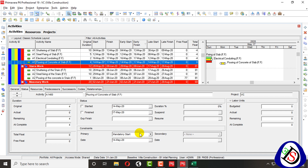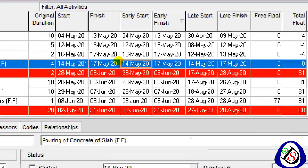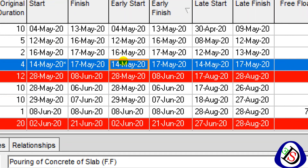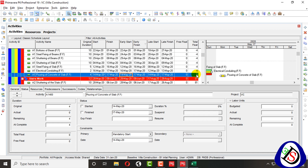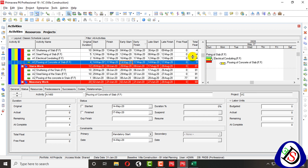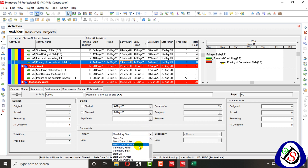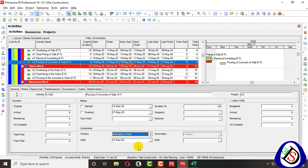You can see from here: Early Start date, Late Start date, and original Start date — all dates are fixed at 14 May. This Mandatory Start freezes and holds the dates regardless of whether the project is affected or not. The overall project float changes, but this activity's own float is fixed at zero, and all other activities adjust due to Mandatory Start.